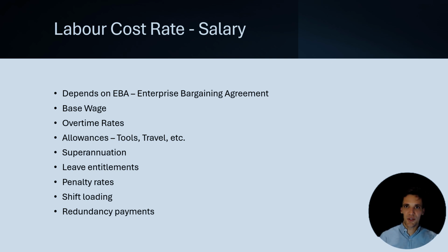The way we do that, in Australia, when we employ someone, we'll have an enterprise bargaining agreement. We have to be mindful of what the specific conditions of the EBA are. In some circumstances, for example, you have to pay people a travel allowance. For example, if you're working on a project that's further than 70 kilometers from the center of the CBD, you might have to pay somebody an additional travel allowance of $50 a day. It really depends on the specific conditions in the EBA.